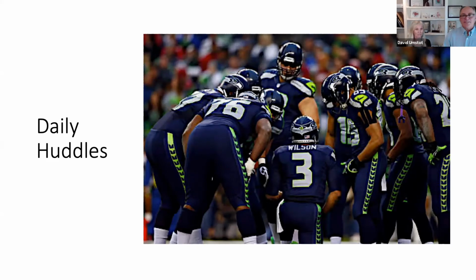But think about this. I mean, daily huddles. We run into teams that don't do daily huddles with Last Planner. And I will say that there's one thing that's a common denominator on every project that we see that's successful: the superintendent has a daily huddle with everybody on the team. And I think if you have a daily stand-up with your Scrum team, the same thing will happen. But think about this.